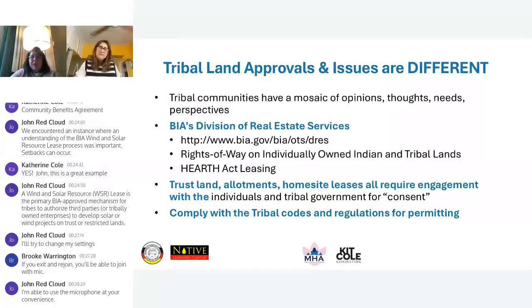I'm working on a project with the BESS, and the developer wants to proceed and move forward with a lease. But this tribe is a HEARTH Act tribe. So when you go onto the BIA website, there'll be tribal listings of these tribes, and that's to help them encourage economic development or have tribal energy sovereignty, to exercise those negotiations with the developer, with the tribe, or with the tribal utility authority.